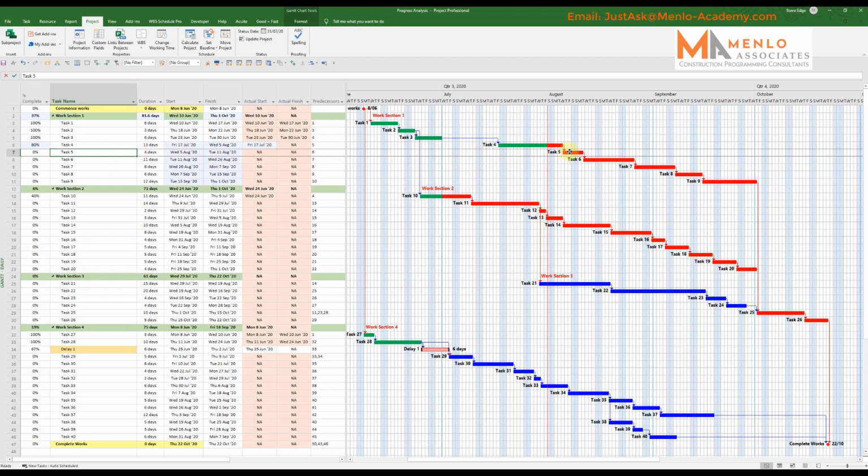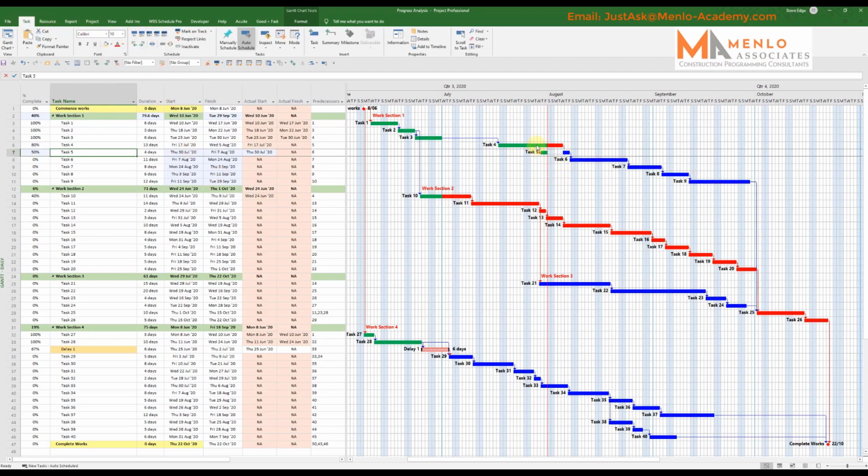This job is set as a successor to it, which essentially the logic is that when this job finishes, this one can start. But very, very often, jobs can start out a sequence, they just maybe can't finish completely, or you can only do so much. And so let's say on this one, they've actually been able to do, say, 50% of this task. So you can see now that it's moved the 50% through.